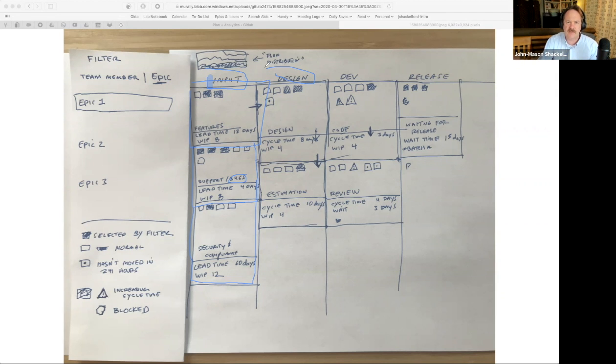And then up at the top, we've got this flow distribution graph. This is the chart of sort of the percentage of those different inputs over time, so that I can see how I'm spending the resources that I have. Am I primarily fixing bugs? Am I primarily building features? What's the ratio there? Maybe I want to make some corrective action around the WIP limits here to adjust that mix.